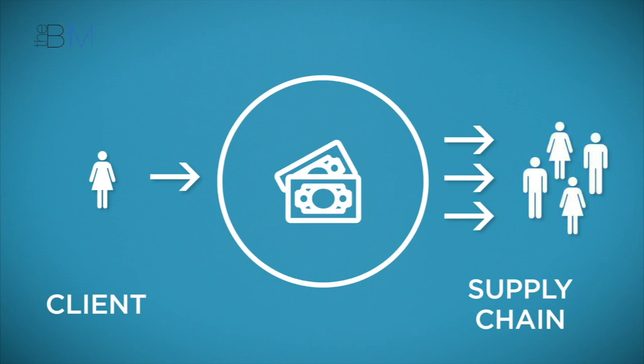The advantage of trust status is that, in cases of insolvency, the monies in the account due for payment to the supply chain are secured and can only be paid to them. You can use project bank accounts on schemes of any value, and a number of banks around the world now offer this service. Several forms of contract have also incorporated provisions for PBA arrangements.